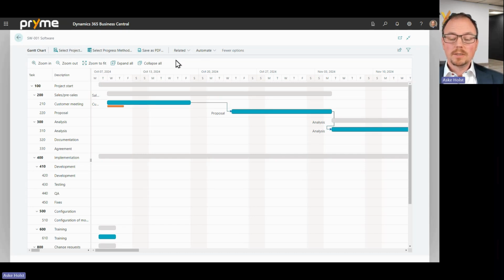And especially as you can also enforce that changes to your budget drive changes in your resource planning, you could have a chain effect of moving the planning in the Gantt chart would move the budget entries. Moving the budget entries would move the resource planning.